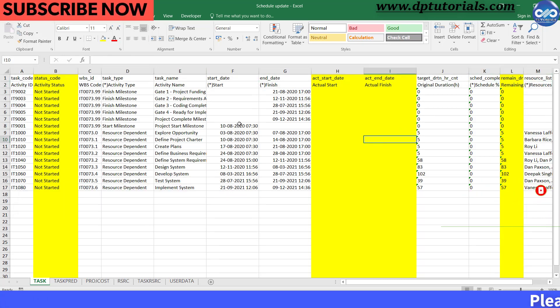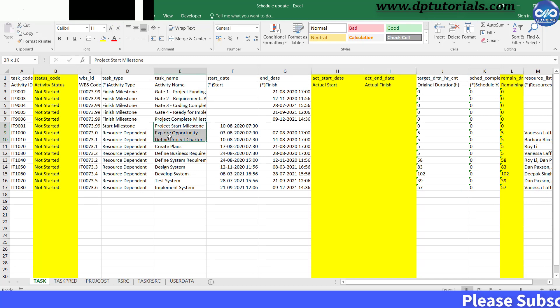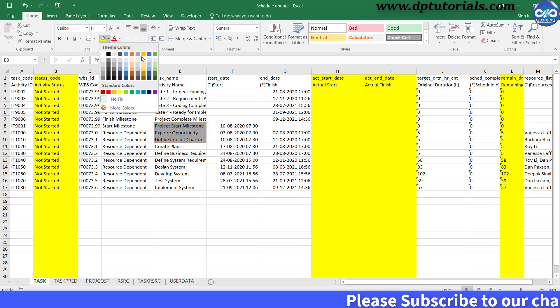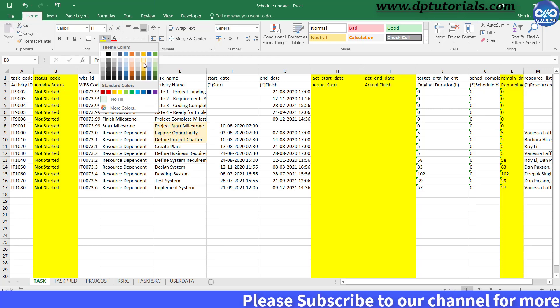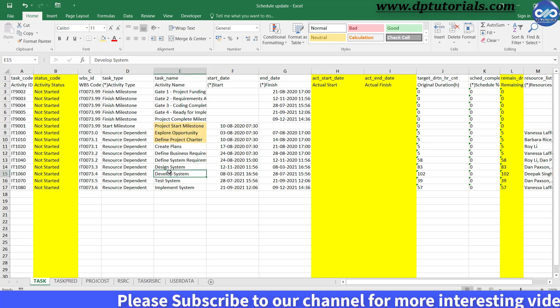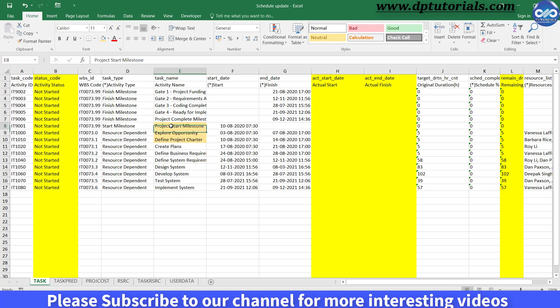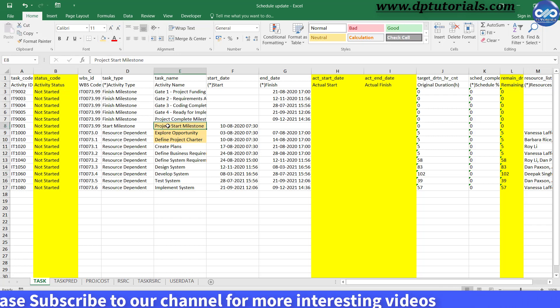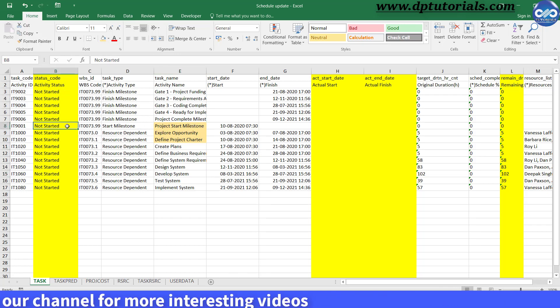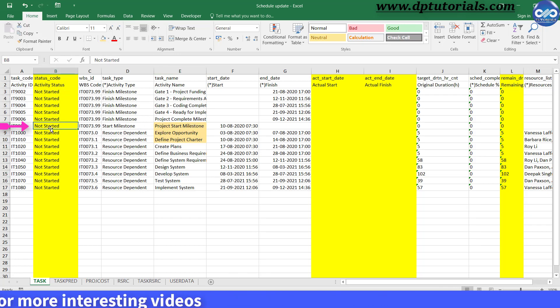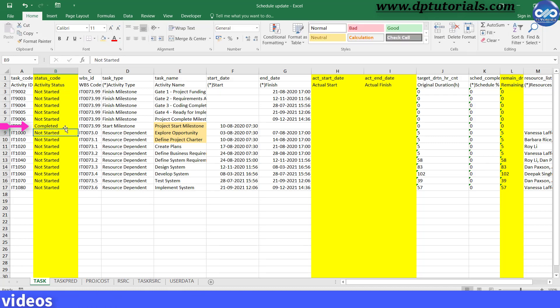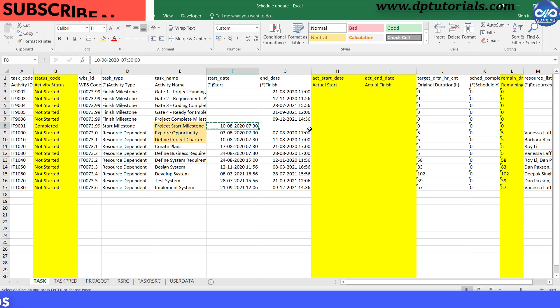Let us update now some three activities to test, say these three: Project Start Milestone, Explore Opportunity, and Define Charter. First, for Project Start Milestone activity, I enter the Activity Status as Completed and Actual Start Date as 10th August. I apply the same format and will leave the rest as it is.